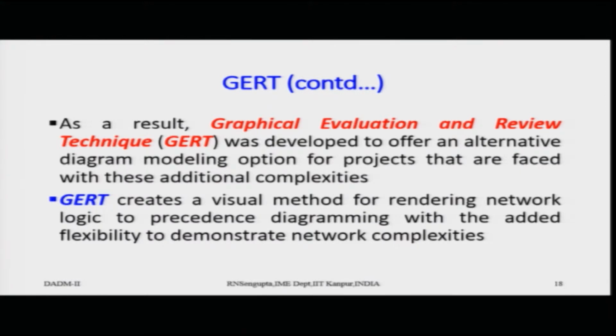So, GERT creates a visual method for rendering the network logical flow. So, the concept goes from the left to the right. So, if you are going from activity 1 to 2, 2 to 3, and then once 3 is done, again you come back to 2 to do some rework. So, all these things would be considered in very minute detail in the GERT process.